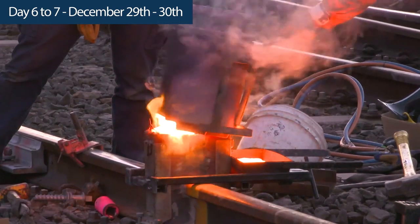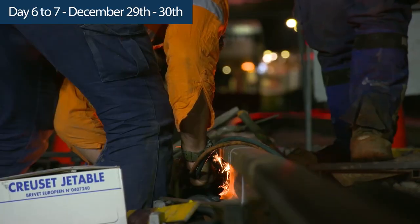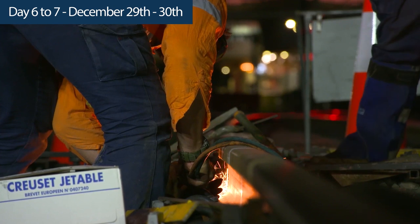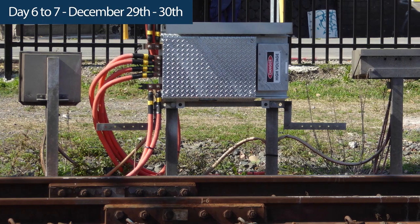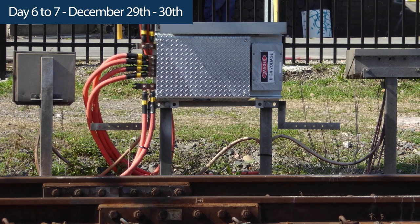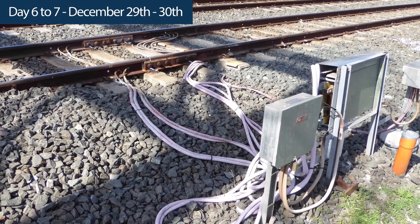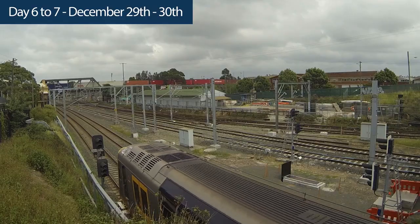Post-tamping, rail welders and track crews will carry out re-railing and adjustment welds on the Bankstown Line, welding of rail joints in the newly installed turnouts and adjustment welding on the city side of the station. The signals team will commence setting the newly installed turnouts to work, bonding the new tracks, certifying signals and connection of track circuits on the up and down Illawarra locals.